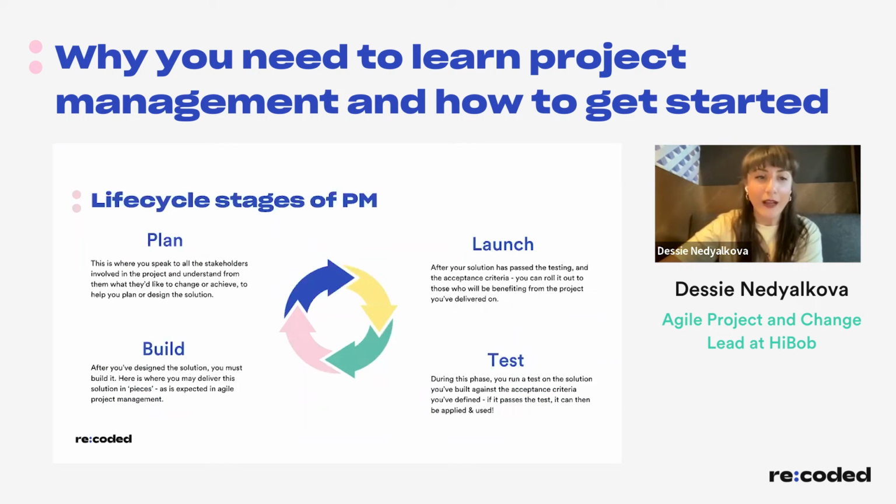Okay, so let's get into understanding what are the different stages of project management of an actual project. Plan, build, test, and launch are the main ones, and you will come across these fairly frequently if you do go into project management. So again, with planning, I cannot stress this enough, fail to prepare, prepare to fail. The beginning of any project is the design or the planning phase, of course. This is where you speak to all the stakeholders, all those members that you're working and collaborating with who are involved in the solution towards the vision or the objectives. And you're looking to understand from them what they'd like to change or achieve to help you plan or design the solution. You then translate that into a project plan, and then you apply the whole governance and setting timelines and milestones and deadlines.